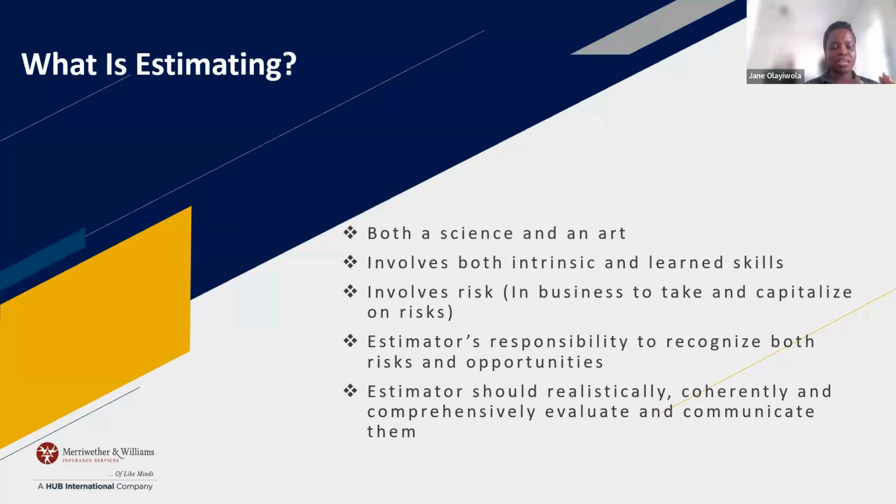Now, it's not all negative risks. There are some positive risks as well. They include opportunities for value engineering, right? Maybe you can find similar products that have the same specifications and qualities that have been specified, but they might be a more cost-effective alternative that you can present to your client for approval. That's an opportunity to save your client some money, especially if the budget is already tight.